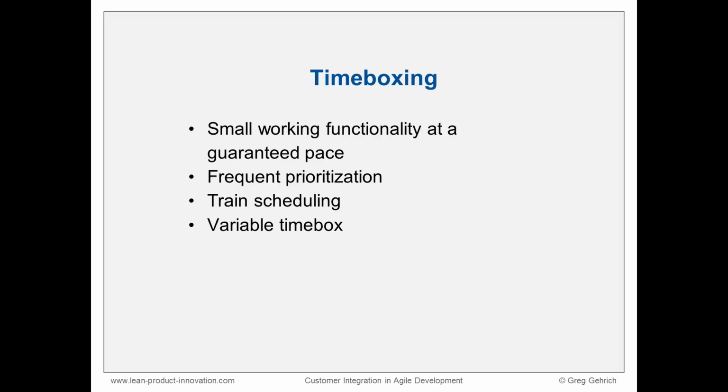Now, there are some proponents of variability in a development cycle. So you have your same short cycles, 1 to 4 weeks, but allowing a bit of variance based on what the team decides to include. It can take less work to carve out functionality for variable cycles because the time boundary aligns easier with natural feature boundaries. When functionality is less chopped up, the build can be more intuitive and more natural.